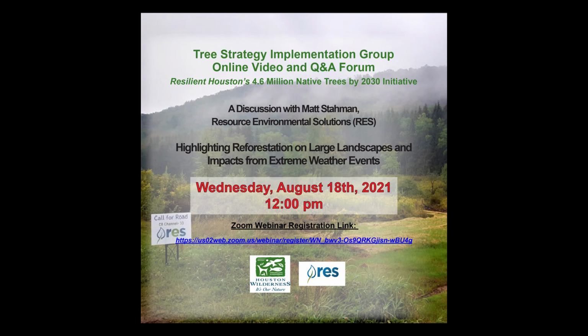As far as the percent mortality, well, we're typically planting 400 to 500 trees per acre, bare root seedlings. You need about 100 to 200 to make it to maturity. In most of our experience as far as requirements are concerned from Corps permits or mitigation plans, that's the target that they're looking for. It's between 100 and 200 trees per acre in a mature forest. And if you think about walking through a mature forest down here on the Texas Gulf Coast, that's about right. You're gonna find about 100 or so mature trees per acre and have pretty close to 60 to 80% canopy coverage or so, maybe sometimes closed canopy coverage.